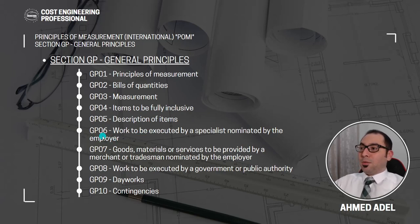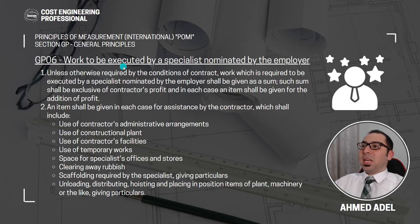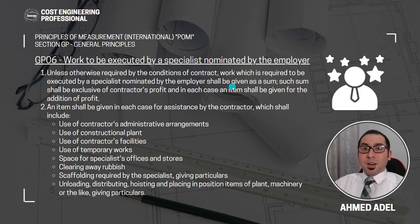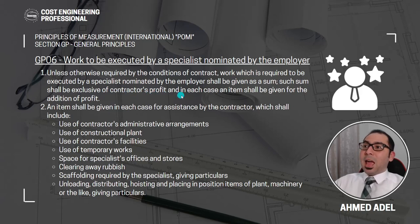In this video we'll start from subsection 6, which is work to be executed by a specialist nominated by the employer. Unless otherwise required by the conditions of contract, work required to be executed by a specialist nominated by the employer shall be given as a sum. Such sum shall be exclusive of contractor's profit, and in each case an item shall be given for the addition of profit.